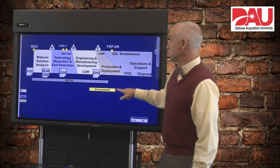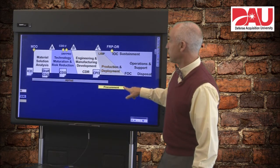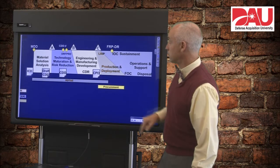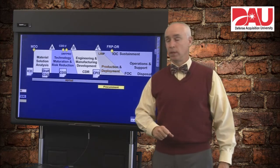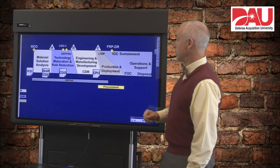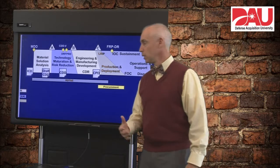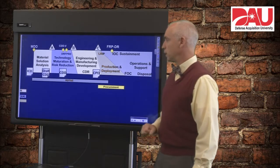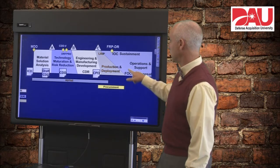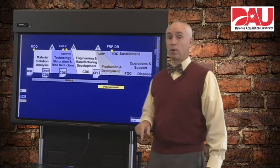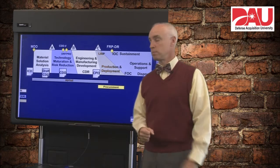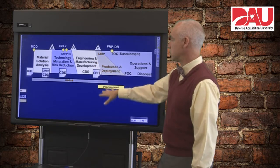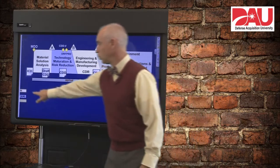Procurement is going to start right here usually at Milestone C, unless we've got an exception and have some money to spend in engineering and manufacturing development for long lead items. But generally speaking, it's going to start at Milestone C and continue all the way through production and deployment until we have bought all of our systems. So procurement tends to be mostly here in production and deployment.